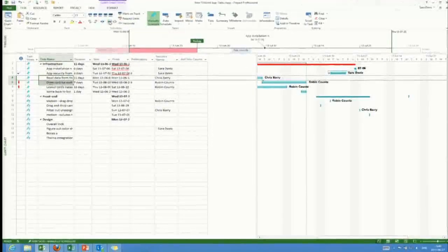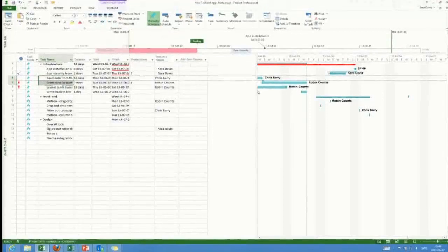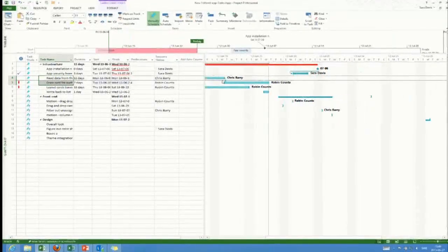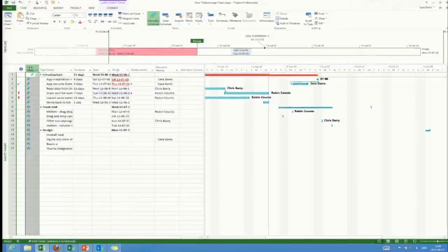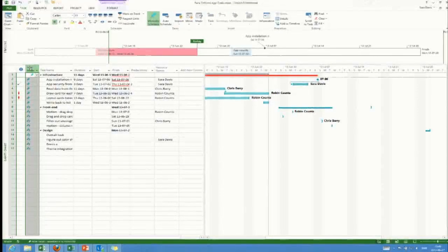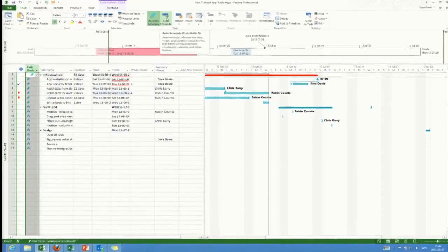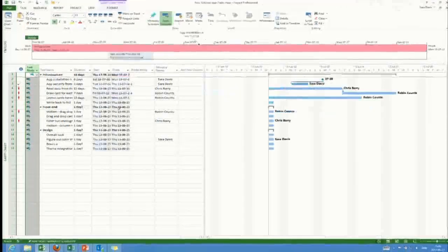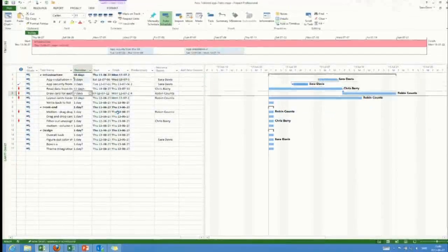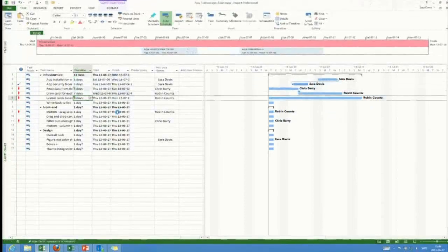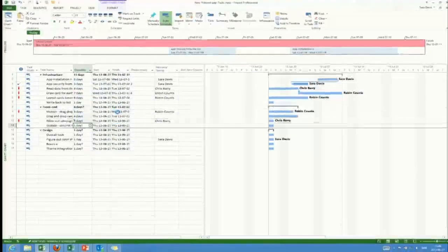We'll link these two together, and they are treated as tasks that have a finish-to-start relationship. And they're pushed out. However, I want this to be more structured. I'm a waterfall person in this case, so even though the app we're creating is actually a task board app for maybe something more agile, this is a waterfall project. So I just click auto schedule like that and add some more days here. If you look at the bars that have changed, you'll see that the shape of the bars changed between the manual tasks and the automated tasks.